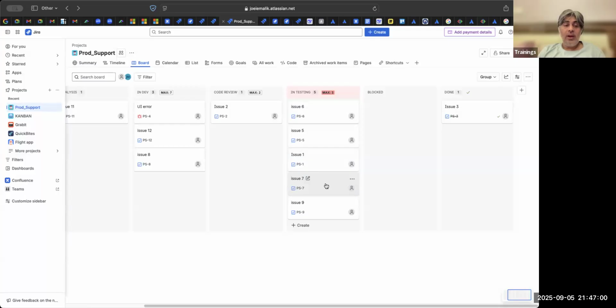So let us assume for one sec that we can't find anybody else to do it. So in those cases, we'll put these things to a blocked state based on the priority. So we say Sudipta will only test 3 items, and these are the 3 items based on the priority. The other 2 lower priority items we will put in a blocked state. Had the developers been trained, but maybe developers are not trained now.